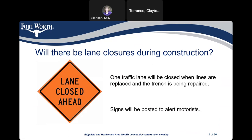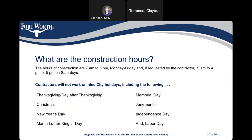As far as lane closures during construction, one traffic lane will be closed when the lines are replaced and the trench is being repaired. Signs will be posted to alert motorists in the area. Construction hours are 7 a.m. to 6 p.m. Monday through Friday, and if requested, 9 a.m. to 4 or 5 p.m. on Saturdays. The contractor will not work on the nine city holidays, which include Thanksgiving Day, the day after Thanksgiving, Christmas Day, New Year's Day, Martin Luther King Jr. Day, Memorial Day, Juneteenth, Independence Day, and Labor Day.